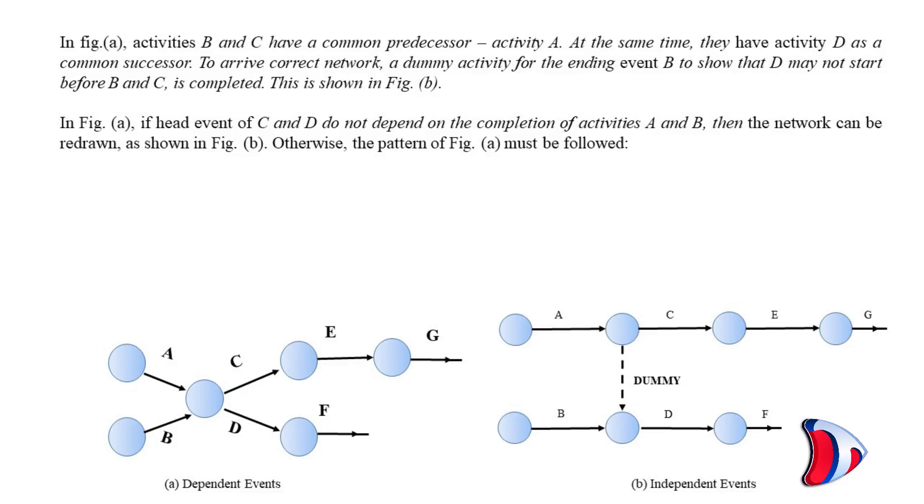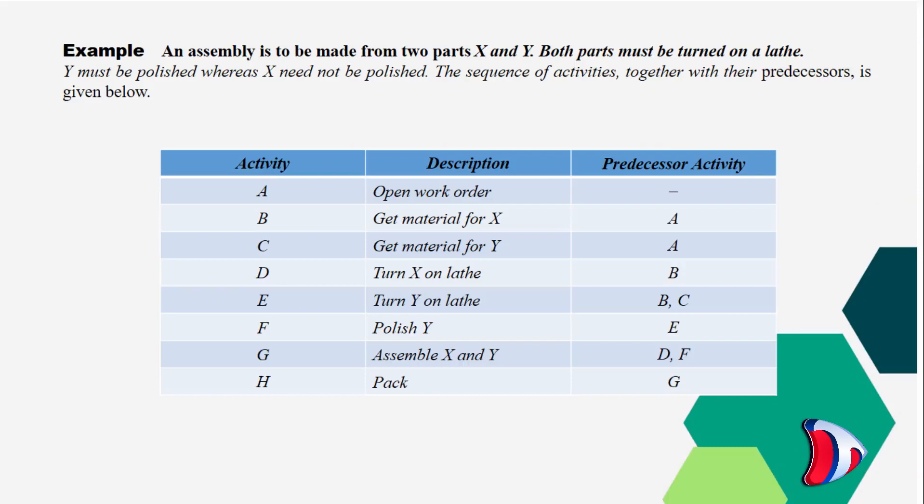Let us understand this with the help of an example. An assembly is to be made from two parts X and Y. Both parts must be turned on a lathe. Y must be polished whereas X need not be polished. The sequence of activities together with their predecessors is given below.